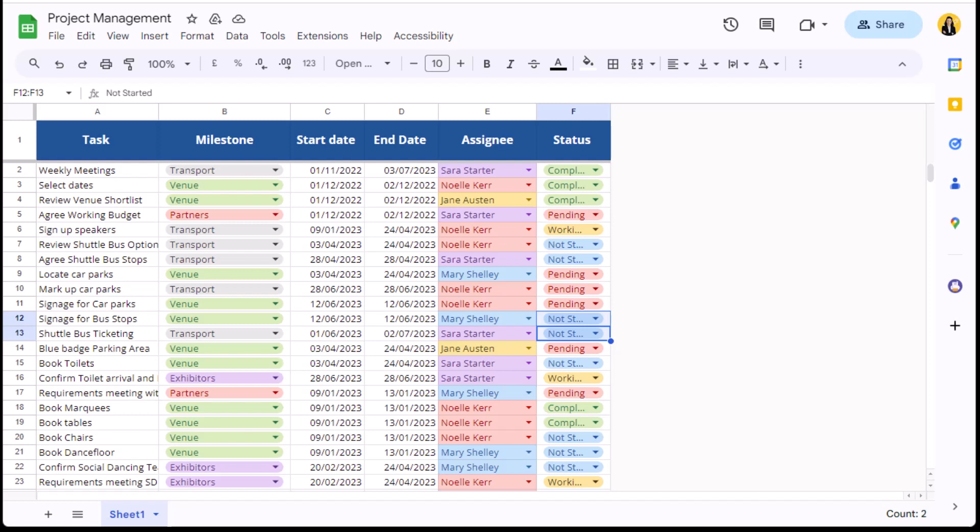There are three columns needed to drive the timeline view. The first informs the card name—in this sheet that is the task column. Next is the start date, and lastly a column that informs the timeline when the task should be completed. This can be provided either as an end date or as a duration period, for example 21 days. Once these basics are in place, the timeline will be able to populate.